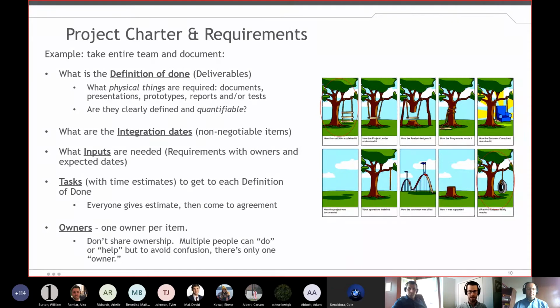And writing that out helps you define what you need, but it also helps the project managers understand, at the end of a project, hey, it took the customer 4 weeks to get us this deliverable input that we needed. How could we possibly get done in the time frame that we wanted to if we didn't have the inputs that we needed? So it helps both you and your project manager and your team.